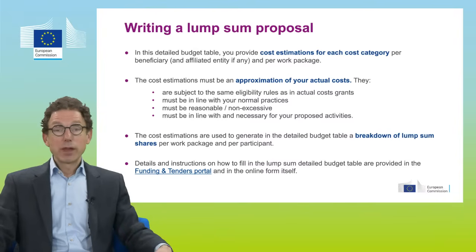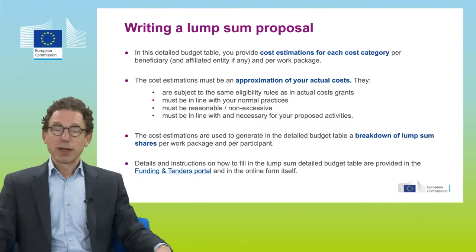These estimates will then be used to calculate a breakdown of the lump sum shares. There is one share for each work package and per participant. That's the resolution you will also later find in the grant agreement and that we use to pay you. We'll see that in a bit more detail later.